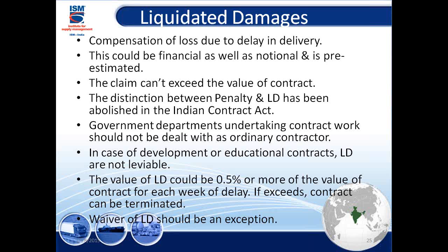So, compensation of loss due to delay in delivery. This could be financial as well as notional, as I said to you. The claim can't exceed the value of the contract. Keep that factor in mind. There's a distinction between penalty and LD, but nowadays under the new act, I think the word penalty has been removed. It is the same thing.